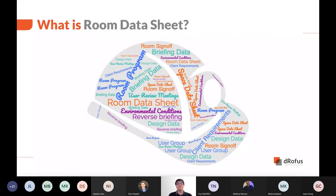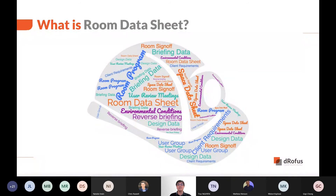There are many different terminologies for Room Data Sheet — it is sometimes referred to as Space Data Sheet, Room Book, or Room Program. The briefing data is provided by the client, and sometimes this data has to be extracted from the client via a reverse briefing process using the Room Data Sheet. It is a tool or document to get every stakeholder on the same page regarding the project requirements, so everyone works towards the same goal to deliver a successful project. On the project, Room Data Sheet is always read in conjunction with other design data from the consultants, and it is used to validate design in the review process and sign off by client representatives.